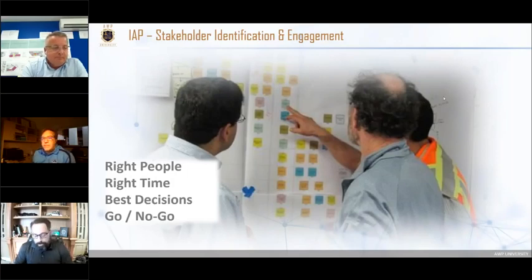Yes. All right, excellent. So great question, Fernando. So what early on in the project lifecycle, if you will, is a good methodology for integrating multiple disciplines and identifying scope, is how I interpret the question. In AWP, probably the largest, the pivotal, the jump off point, often after project identification itself, is going into IAP sessions, interactive planning sessions for the development of the path of construction.